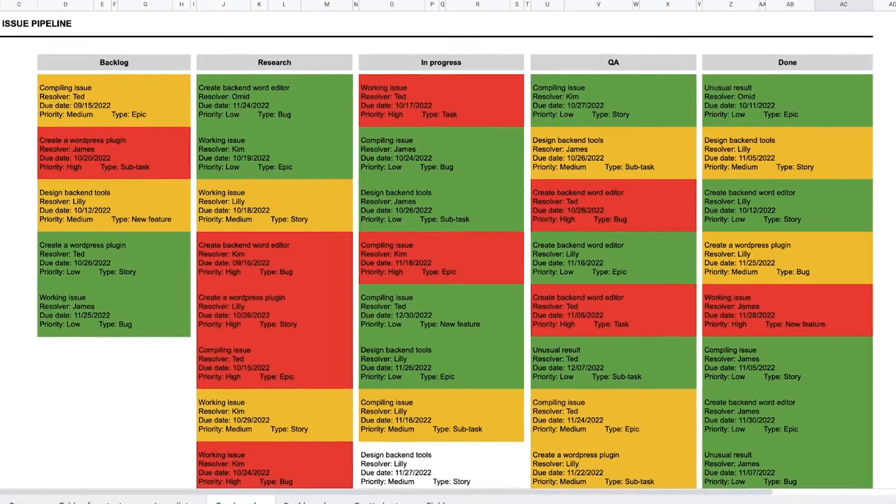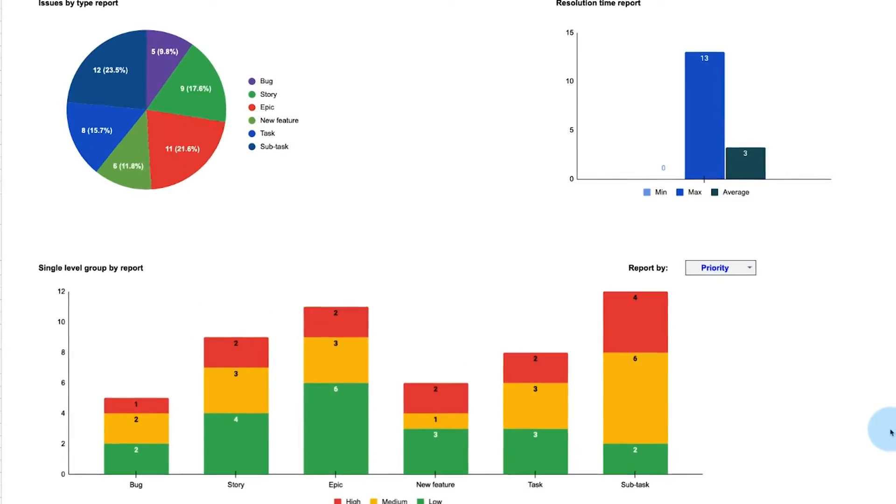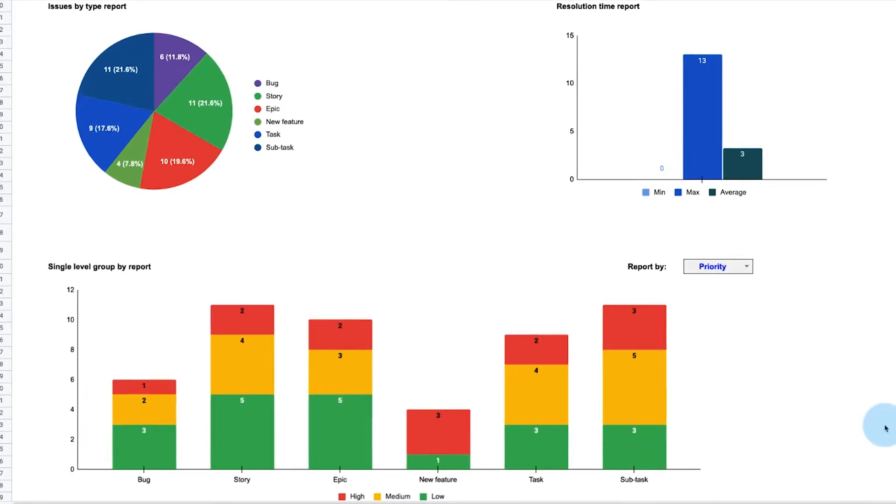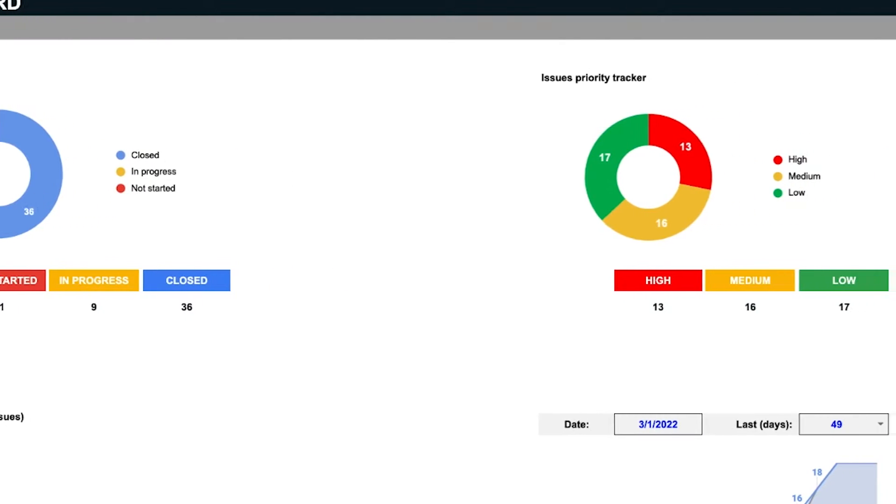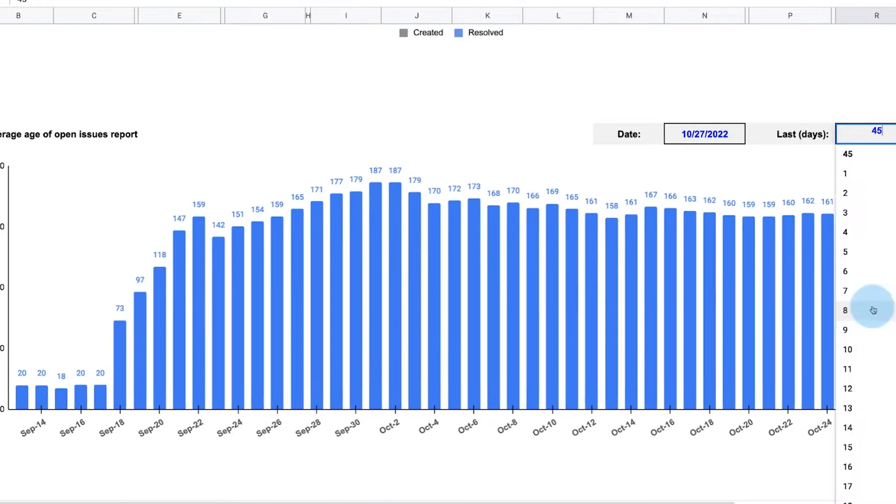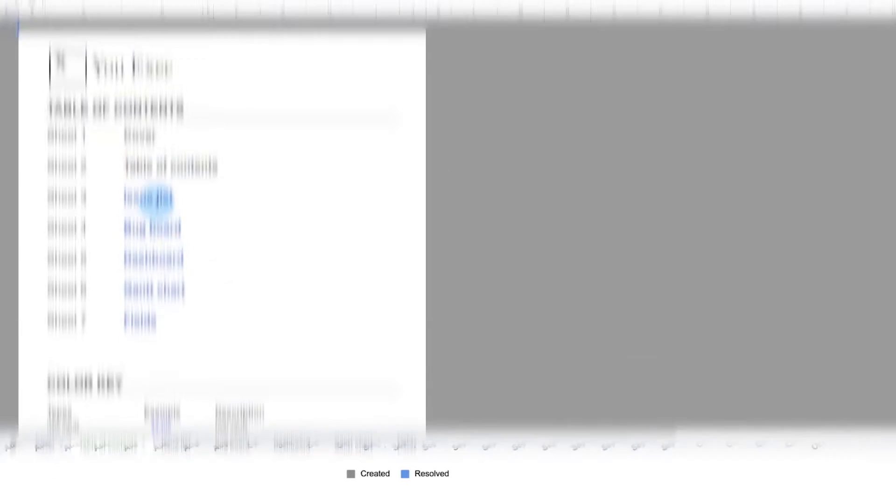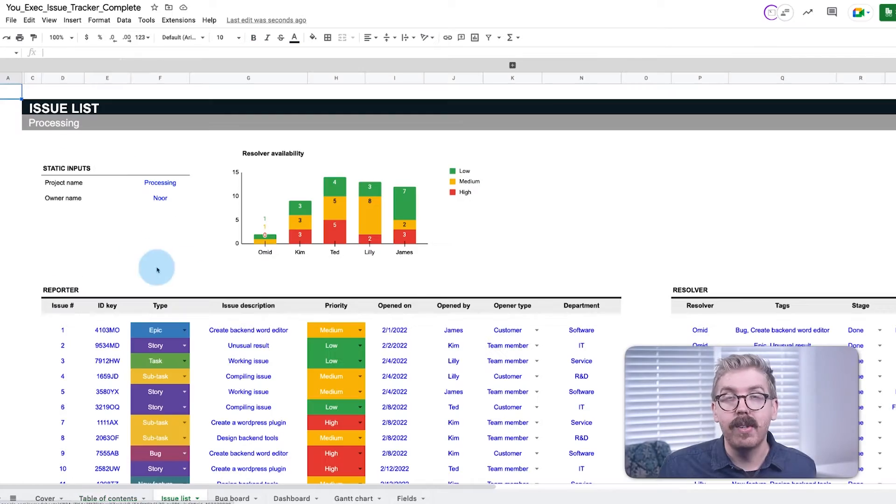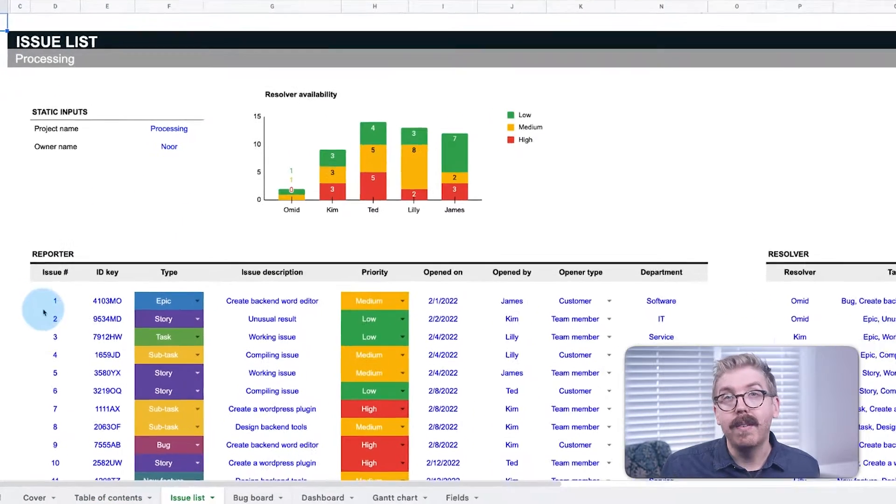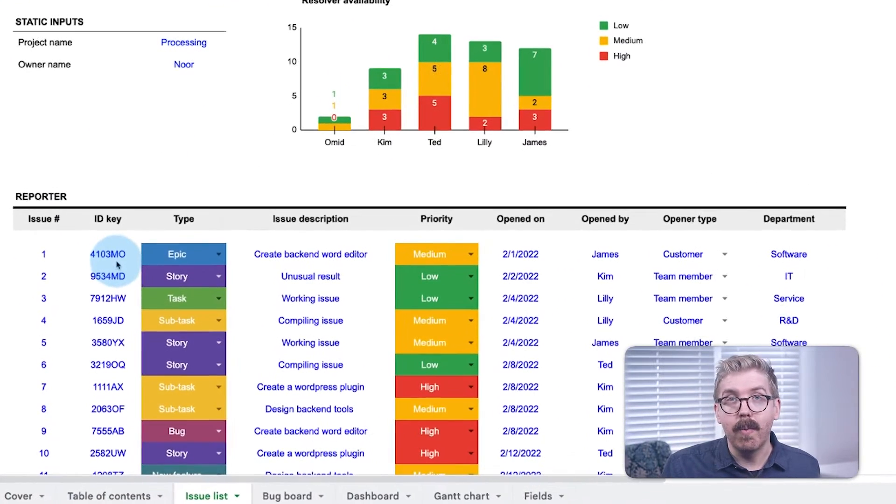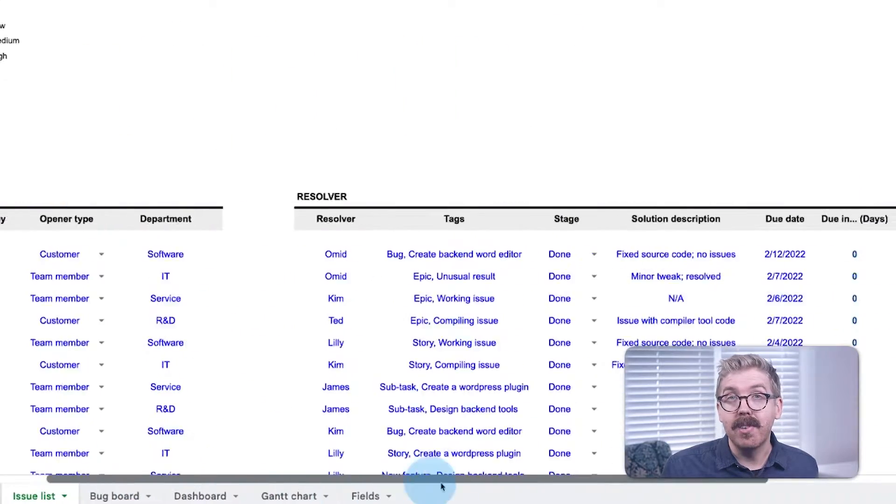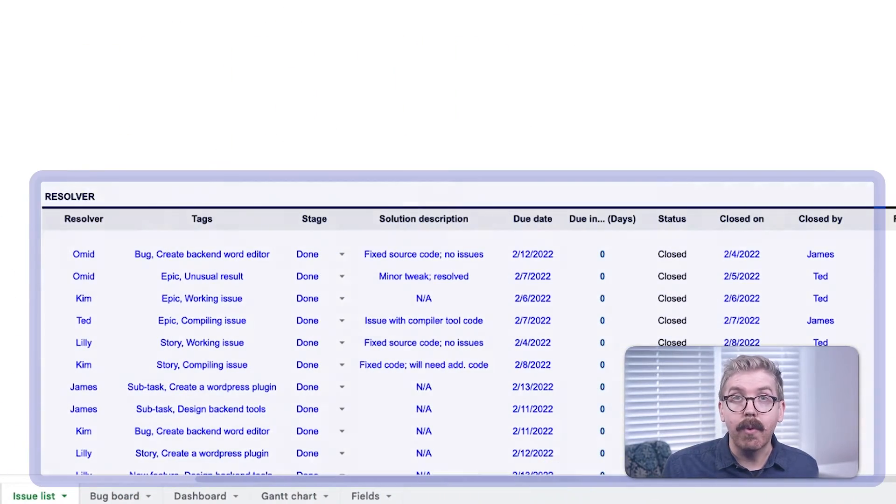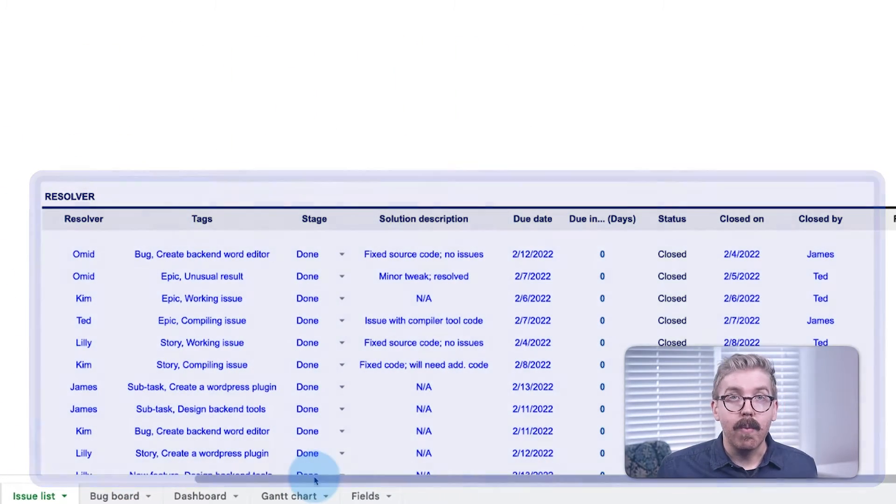This is an Issue Tracker spreadsheet template we created, and it's meant to complement whatever Issue software system you use. To make ours, we started by making an Issue List to track open tickets, then divided the list into a Report section for whoever opens the ticket, and a Resolver section for whoever is assigned the ticket.